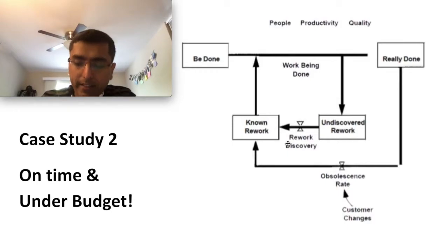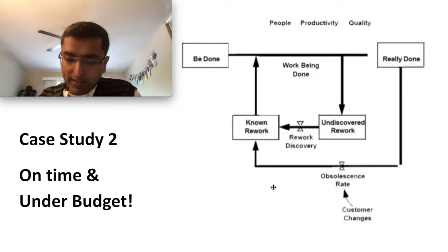So the company that took this order from the US Navy found out very quickly that they are incurring huge cost overruns because of rework, because of new changes, and they wanted to get at least close to around $500 million more from the US Navy, saying, hey, this is expensive. We need to rework our contract. The US Navy was just not ready to say, hey, this doesn't make sense.